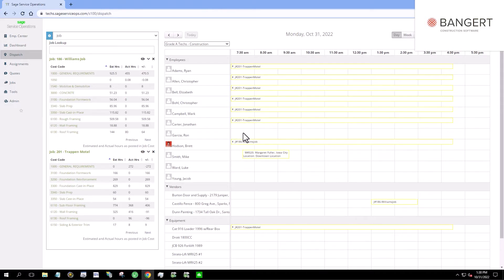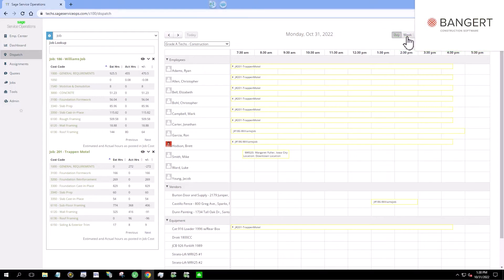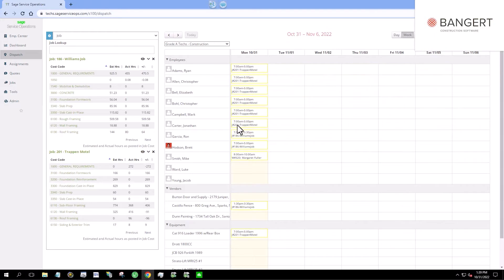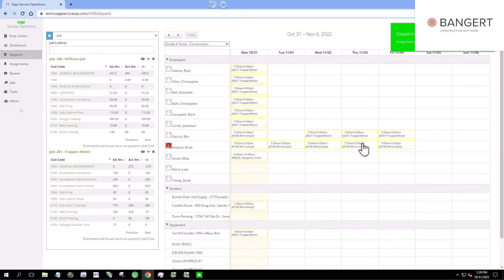And you can see that I have all of these folks working at the trap and motel today. Let's say I want to schedule something for Ron. Let's say I want him to go out and do rough framing. I could go ahead and just highlight that, put it on Ron's schedule for today, and then I could just drag it across to occupy the day. You can see right up here, we can also show it by the week or by the month. So you can quickly change the timescale and look at things in different ways. So if I was planning on being out there all week, I could just drag that across and that would schedule myself for the entire week.